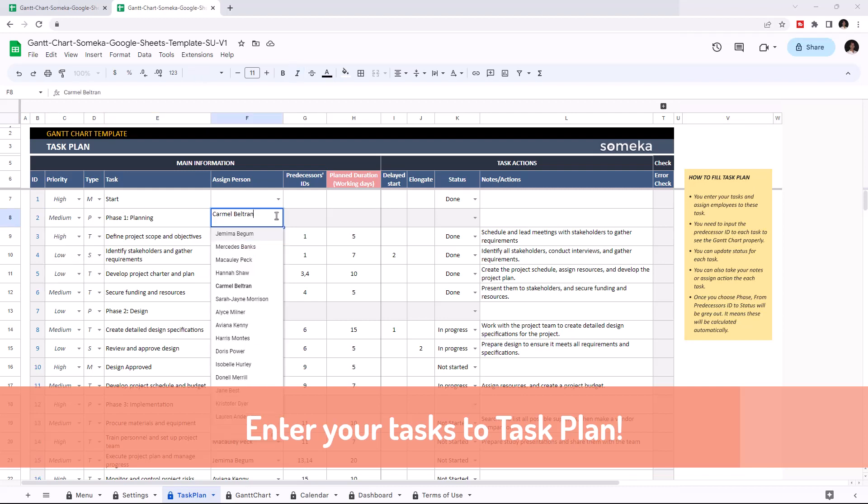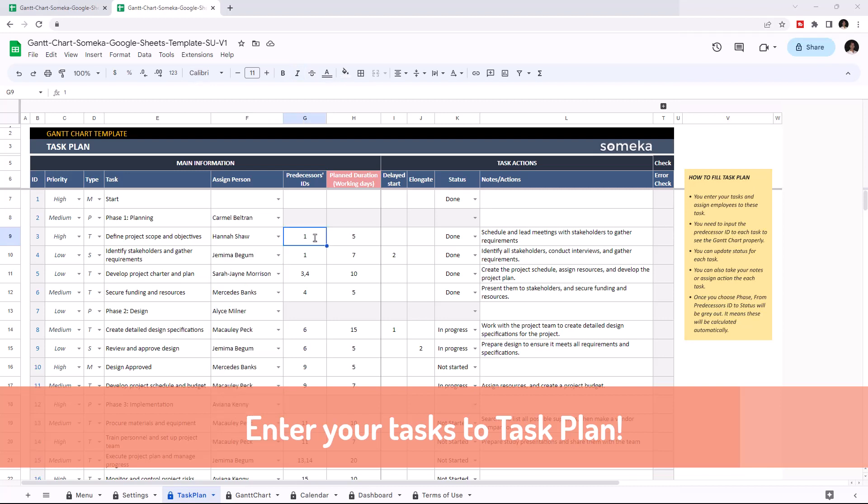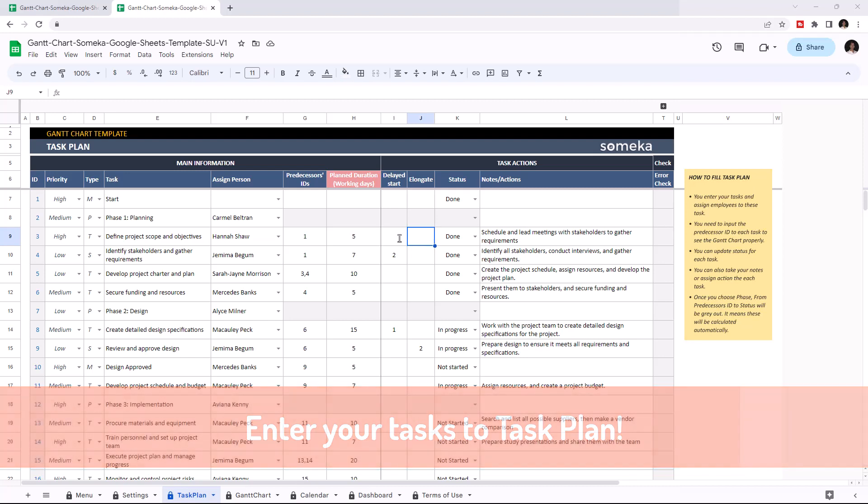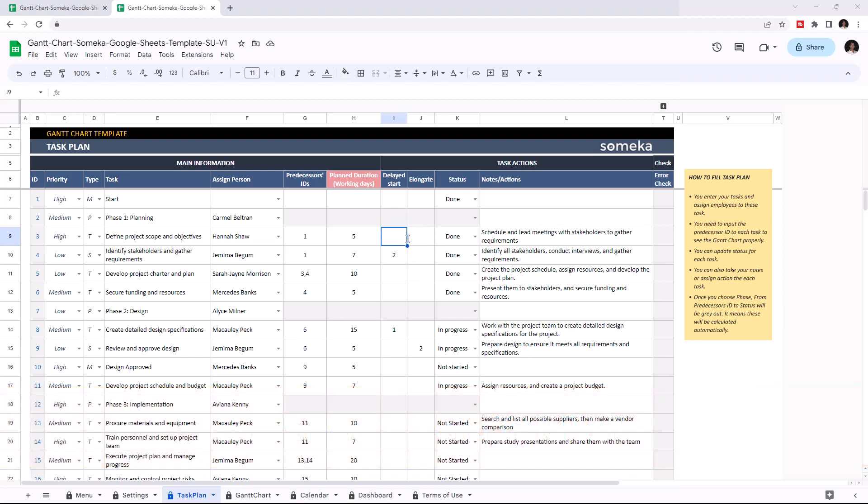Then you can assign a person for each task and choose the ID of the previous task. Then you can indicate the planned working days, and if the task starting date will be delayed or you want to extend the planned working days, you can indicate them here. And you can choose the status from the dropdown list.